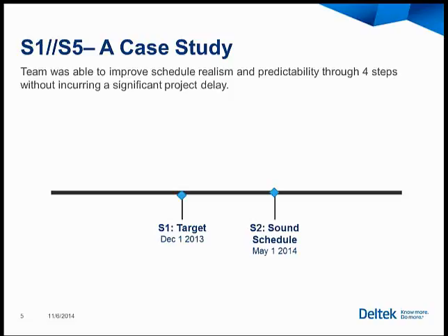The schedule didn't come in earlier. The higher quality, more realistic version of the schedule went out to May 2014. Some rough math, that's 6 months. Enter the risk-adjusted schedule, taking into account the risk register and the variability of just getting certain types of work done. Created almost a 1-year schedule delay in this project.